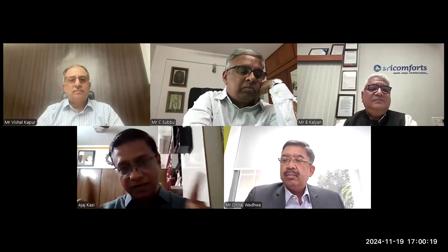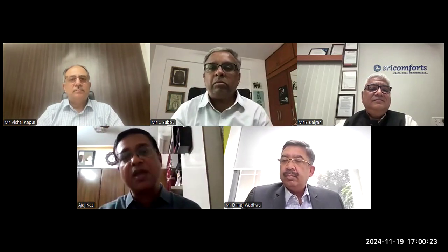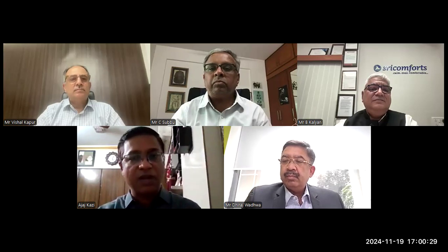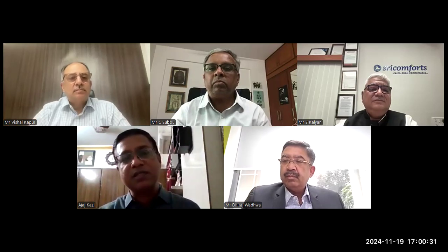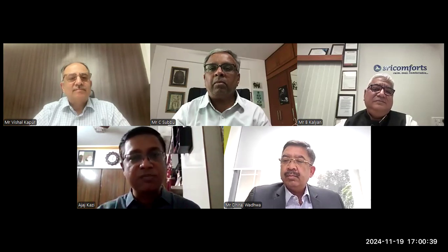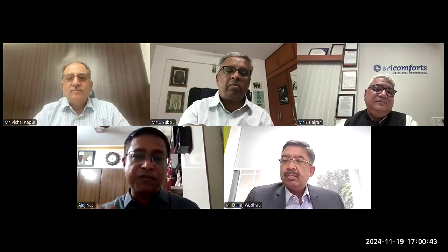So I need every component's efficiency or the measurements as well as a holistic system. And for that, BMS is a major thing. And I always find BMS is the last casualty, as you said. It doesn't get commissioned. So first thing, I think as an owner, we should get the BMS system in commissioning when the system gets commissioned. So I should have the proper data of this system.